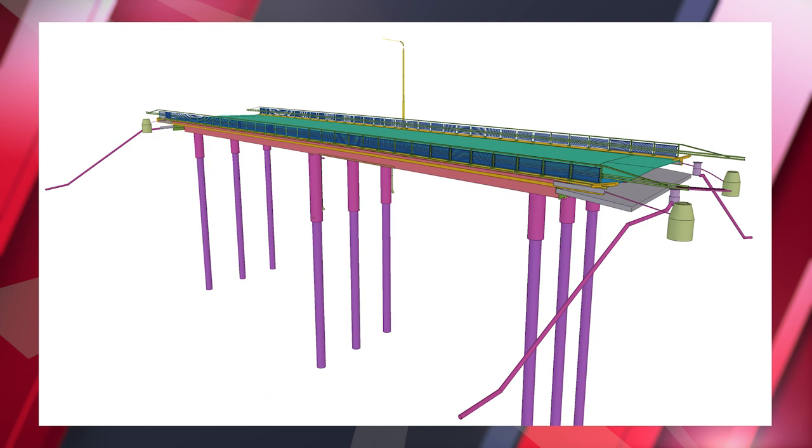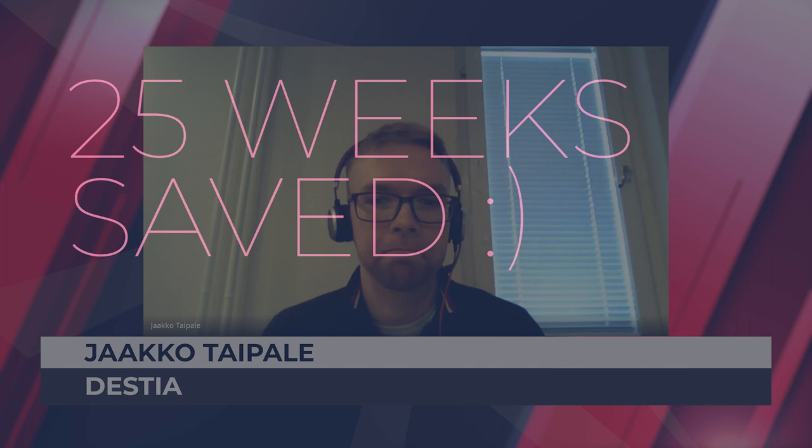Now I have a question here, I don't know who wants to answer it. What are the main benefits from design to construction? In my opinion, it's the time saving. I think we have saved 20 or 25 weeks with this process. We have made this process more straightforward. It's easier to make changes to plans and everything like that if we are doing it only model-based. We don't have to produce any kind of papers and chase them. So the process is more straightforward all the time, in both directions.